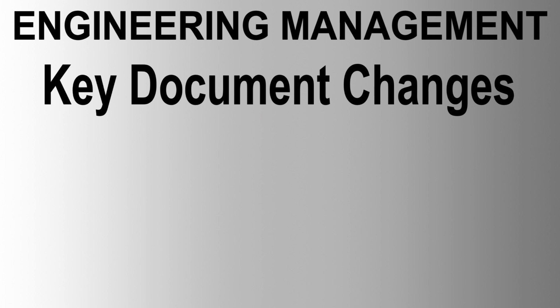Key Document Change Notice, KDCN procedure. Objective: to provide guidance in the management of changes to key documents post-frozen status. Applicability: applies to changes within the project that could affect key documents that are either post-issued for design or issued